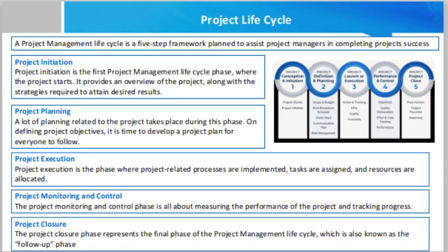Develop a business case. Before developing a business case, check whether the essential pillars of the project such as feasibility, scope and identification of stakeholders are in place. The very next step is to come up with a full-fledged business case. Creation of a statement of work and the formation of a team wrap up the project initiation phase. Next one is the project planning.